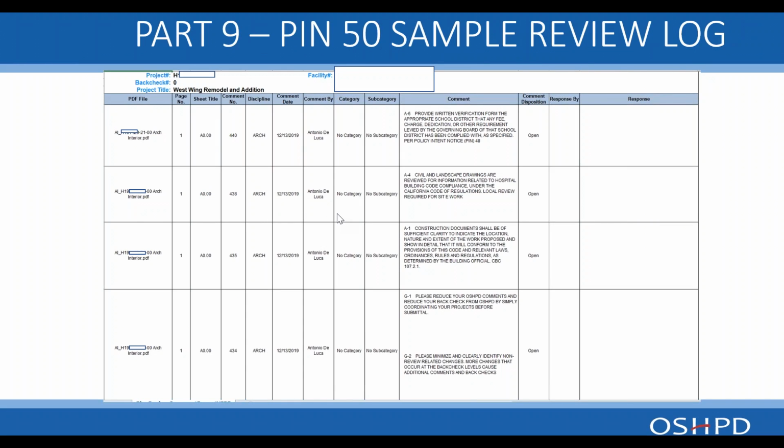This is a sample of the review log, and again, as I mentioned before in a previous session, shows the page number, the sheet title, the comment number, the discipline that created the comment, date, the person that wrote the comment, the category, and the comment.